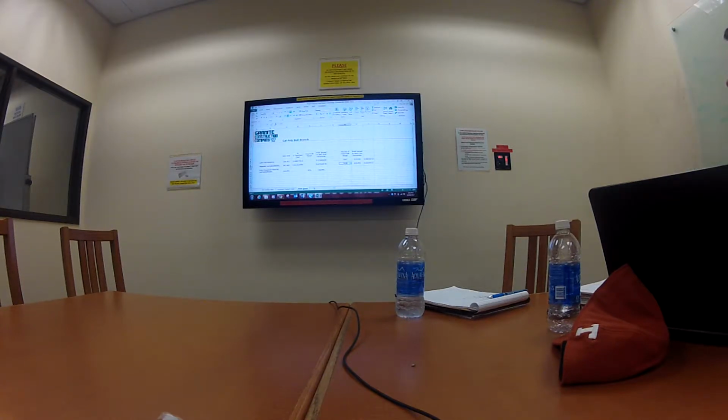You take that 214,000 divided by the 446,000 over there, and that's 48%. Or no, sorry, that's 48 cents per dollar. Yeah, there you go. So that's where those ones came up from. How did you pick that percentage? I mean, just the thirds.